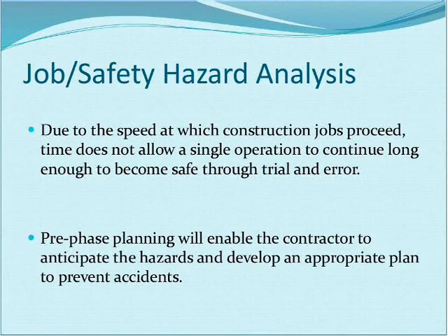And I like to put this in here because due to the speed at which construction jobs proceed, time does not allow a single operation to continue long enough to become safe through trial and error. You can't just guess at it. When you start to guess at it, when you don't have a plan, when you don't have a written plan, when people aren't trained in accordance with that plan, site specifically, that's where accidents happen. Pre-phase planning will enable the contractor to anticipate the hazards and develop an appropriate plan to prevent accidents.